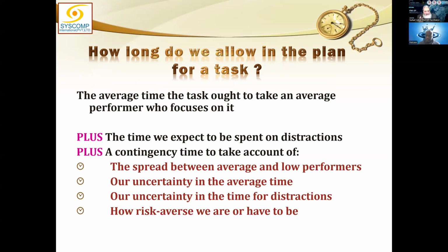We take in mind the person who could do it the best way. So, for the calculation purposes, we are always too optimist. But when it comes to hiring, we get the worst of the people and they cannot do their job in the time allocated. That is one reason why the work cannot be done in the time allocated.